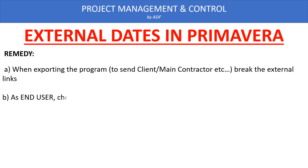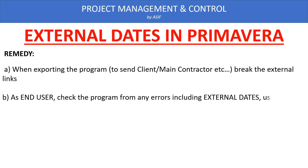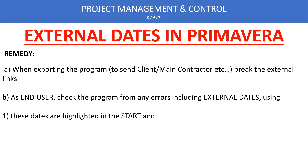Number two: as an end user, when you receive a program from any contractor, supplier, or subcontractor, you have to check it for all these errors, including external dates. To check whether the program is affected due to external dates, there are several ways. Number one is to show the start and finish columns in the layout. In the start and finish layout, all activities which have constraints are marked as static.